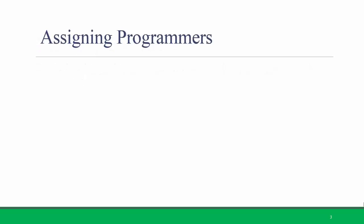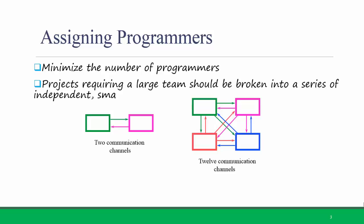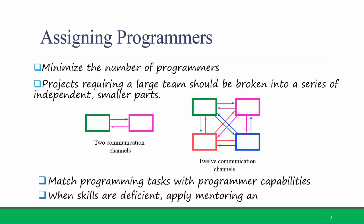The first key task in managing the programming process is assigning the right programmers to do the coding of the new system. First, try to minimize the number of programmers. The more programmers you have involved, the more coordination and communication channels are open. Projects requiring a large team should be broken into a series of independent smaller parts to reduce the coordination costs. Try to match programming tasks with programmer capabilities and strengths, and when skills are deficient, apply mentoring and training.